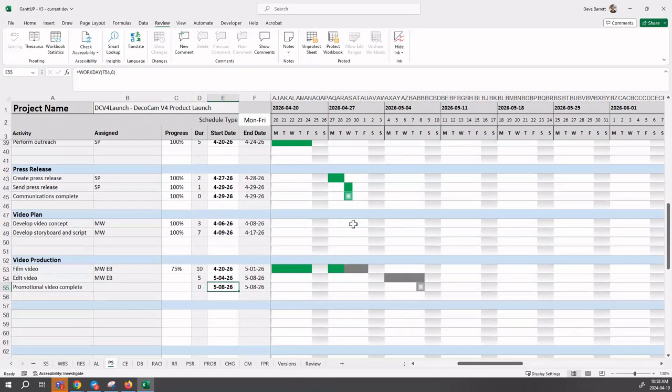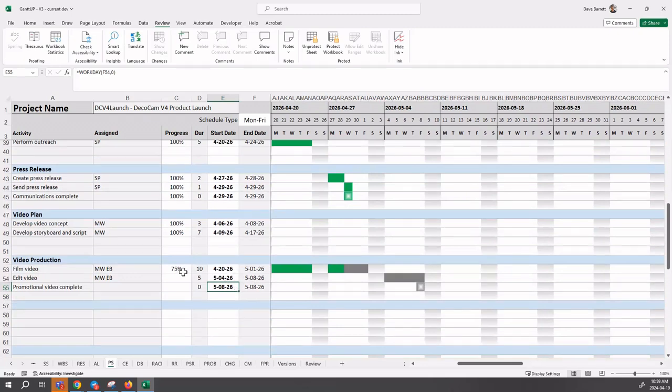We scroll down and look at the activities that were happening this week. We're now going to see a bit of a problem here. This task 'film video' was planned to be complete by Friday, by today, and it's not. It's only 75% done, not quite complete.